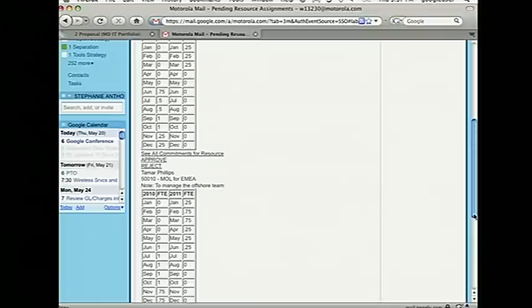So we think this will actually help us because besides the expensive tool we have now, we've actually had other expensive project management tools. And our main problem is the data integrity, because we can have the fanciest tool in the world, but if people won't update the data, you've got nothing. And that's a big problem with resource management, because resource managers, you've got all these people, they don't want to log into a tool. They don't care. So we're thinking with the email, they're going to get their data in. It'll be a lot easier for them.